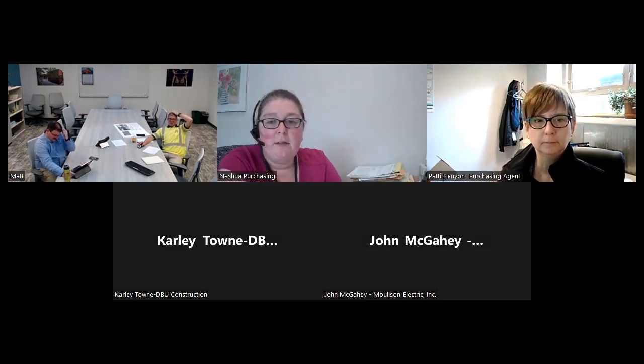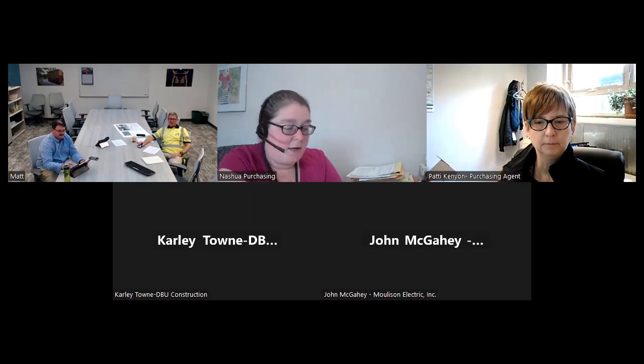And while you're doing that, I'm going to go over how to submit your bid for this project. If you would like to submit a paper submission, you can submit one paper copy and one digital copy on a USB drive stick in a sealed envelope clearly marked with the bid number. If you would like to submit electronically, you can submit via Bid Express. A digital ID is not required, but there is a transaction fee charged by Bid Express. The city does not receive any of those funds. And Bid Express tutorial documents are available on the city's website if you have questions on how to upload it.